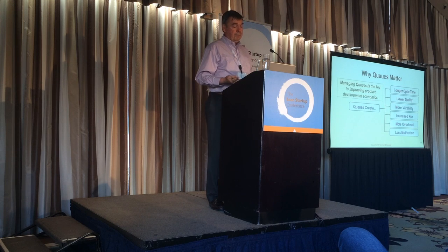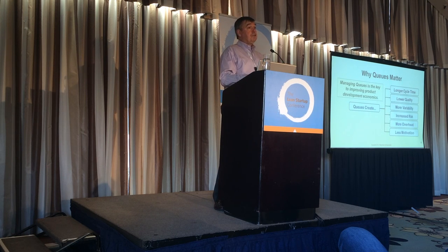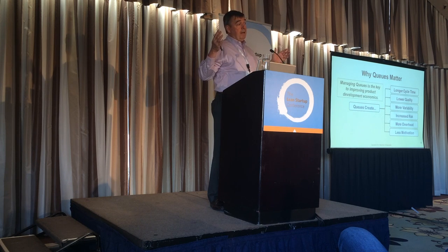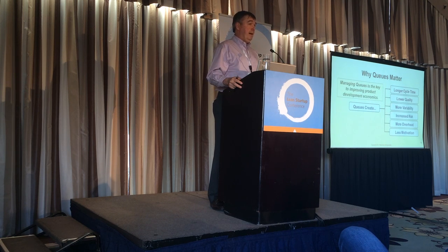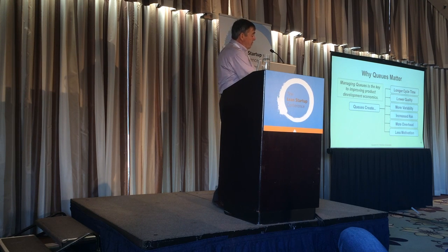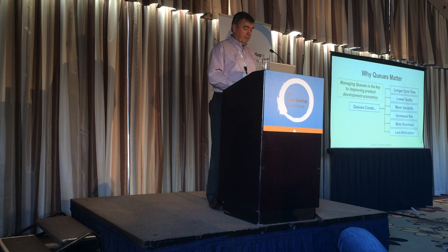Okay, what are the problems caused by queues? Massive problems. The cycle time problem is obvious, but some people think as long as the queue is off the critical path, it's a free queue. My observation is there are no free queues in product development. You could end up having a module of software you're working on that is off the critical path. If you have a queue in testing associated with that module, you are delaying feedback to the person writing that code, and delaying feedback has an economic cost. So the biggest cost is usually cycle time, but there's always an effect on quality in terms of delayed feedback when you permit queues to be present in your process. A lot of other effects, I don't want to talk about them right now.